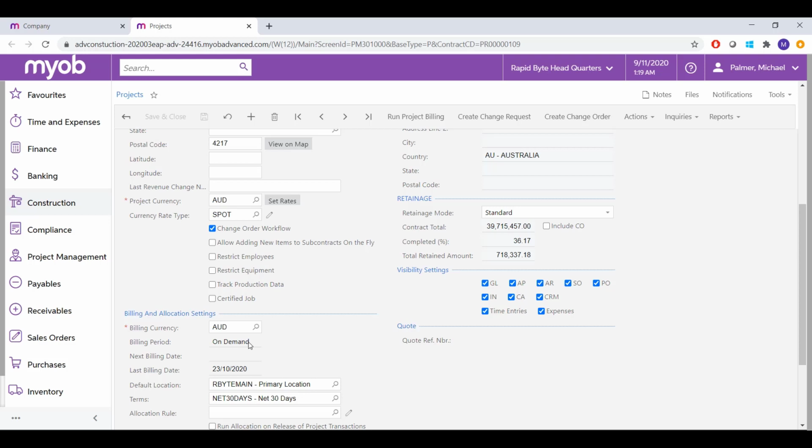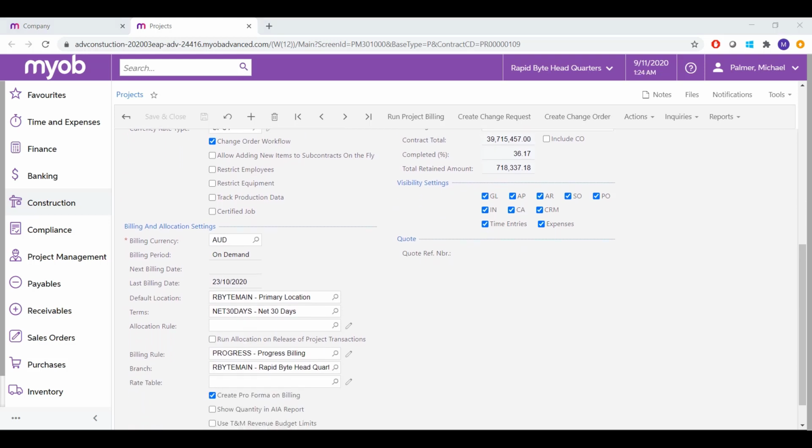As I mentioned earlier, the billing engine for projects is very configurable. Billing rules allow us to set up multiple billing types. Whether you are handling progress billing or milestone billing, you are able to bill based on what you've completed. It could be time and material that takes it from the actual cost, or even if you're doing some sort of cost plus engagement where you're putting up a markup on top of the cost that you have from your subcontractors or the cost of materials.